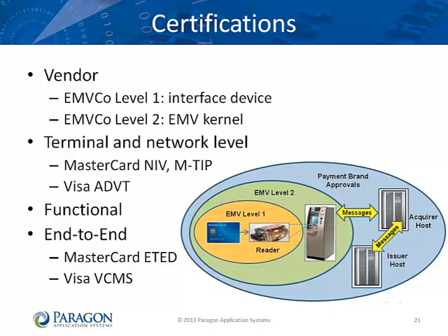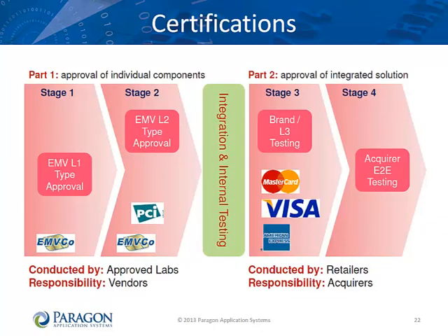Work with the global card payment networks to obtain the certification test plans and requirements. Here is the bigger picture of terminal certification. Your vendors are responsible for EMV-CO Level 1 and Level 2 certification. Once you have completed your development and terminal configuration, you will complete your internal testing and QA.